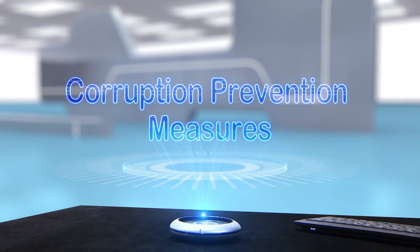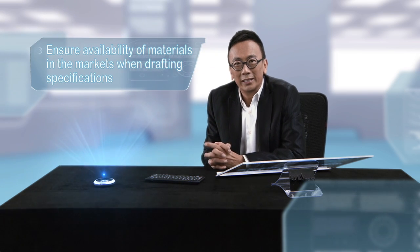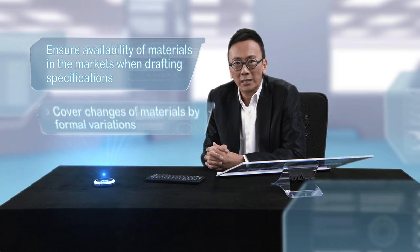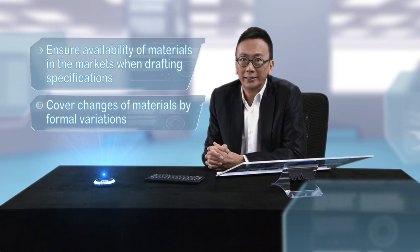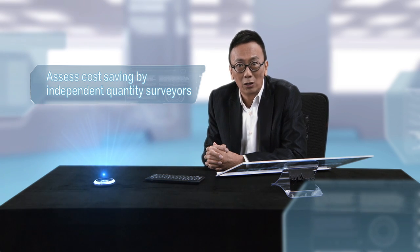The second risk is substituting materials with cheaper alternatives. Some construction contracts specify the materials to be used. Contractors may recommend architects to approve cheaper substitutes to pocket the price difference, or even resort to bribing architects to approve those substitutes. Consultants, when drawing up specifications, should ensure sufficient choices of materials are available. All materials must comply with specifications, and any changes should be covered by contract variations. When necessary, the client should engage an independent quantity surveyor to assess the cost savings and adjust payments to contractors accordingly.